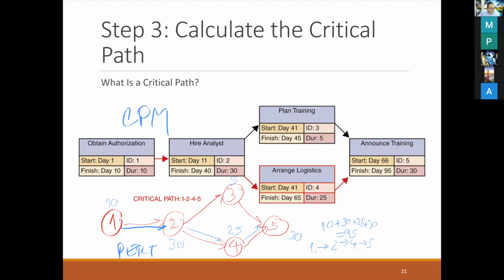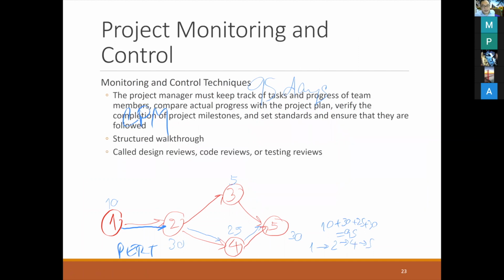So why do we have to do project management? How do people charge? You can see the number of mandays like this, we charge the customer in number of mandays. For example, in this diagram the total number of days is 95 days. The thing you have to know is that we also specify who is responsible for each task.